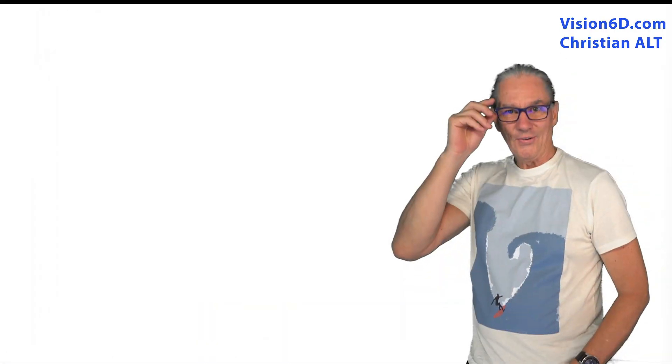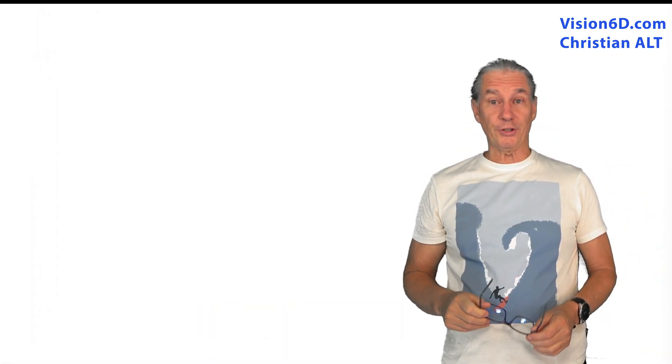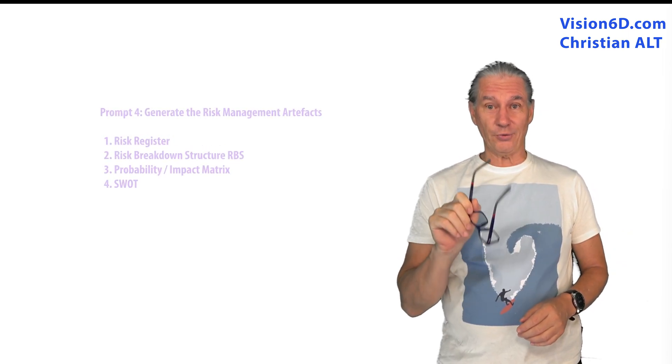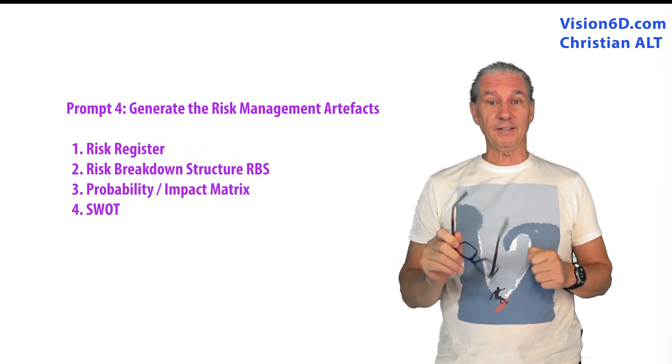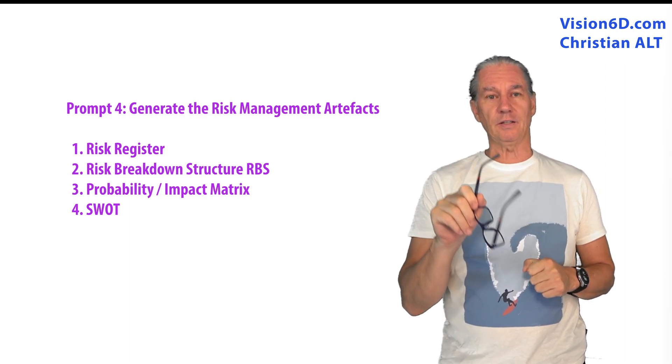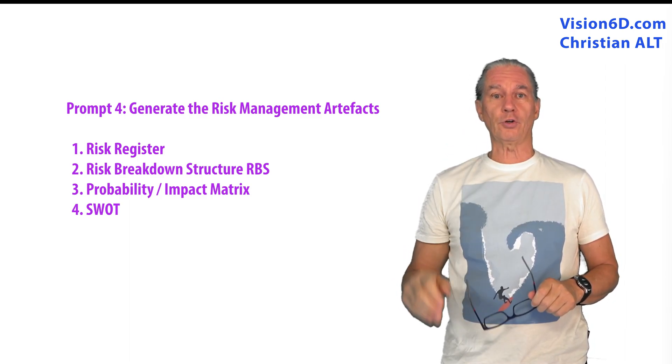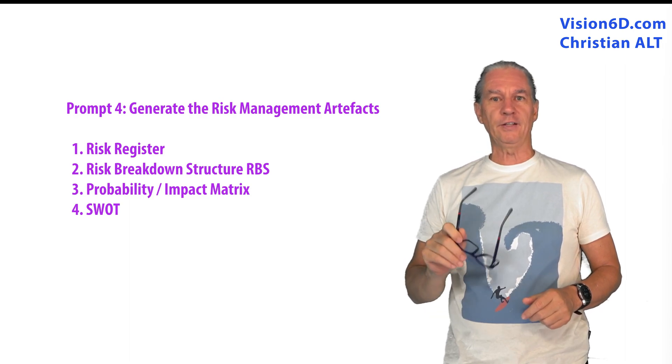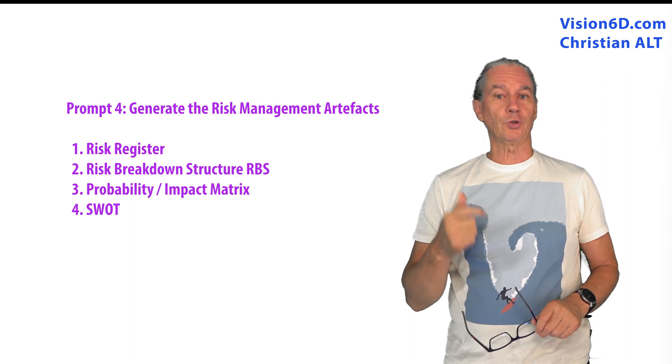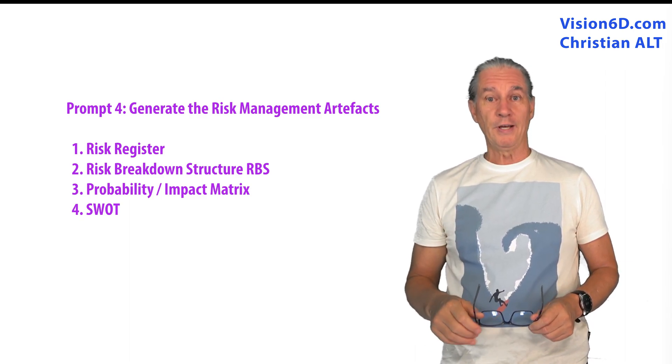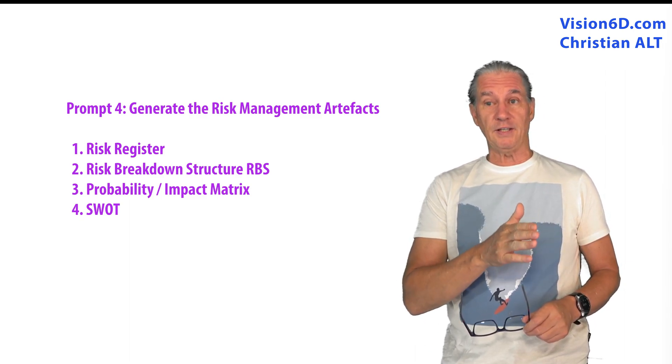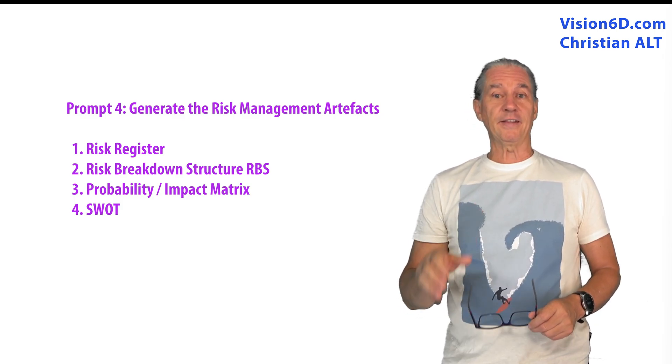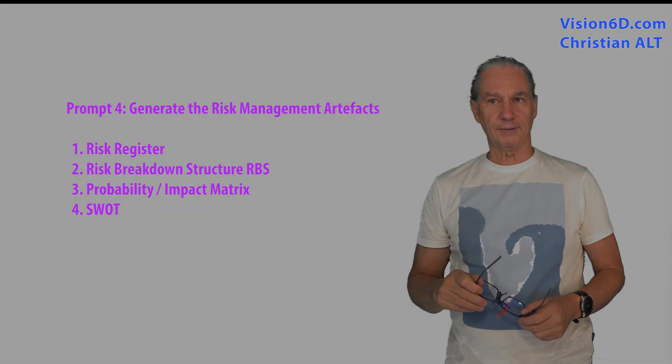So now it's when we start really to work with ChatGPT on risk management. With all those data, the next prompt, I'm asking it to generate me the four common documents that we find in risk management. First of all, the risk register, the risk breakdown structure, the matrix where we see probability impact, and then the SWOT in a tabular format.